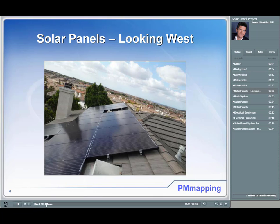Let's look at some photographs. This is the solar panels looking west. There are a total of 30 solar panels installed on the top of the south-facing roof. You can see there's a chimney, so we couldn't place a panel there. There are also some vents in the roof where we were not able to install panels. That's a critical part of the design phase — calculating the number of panels and confirming the roof has adequate area to install them all.